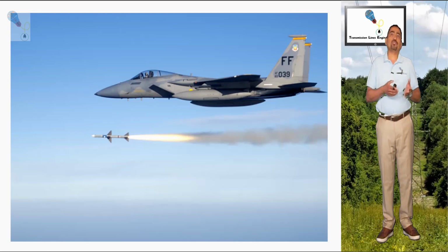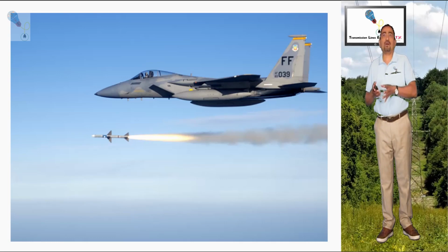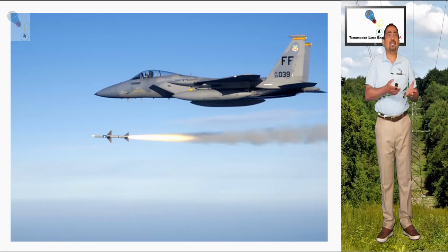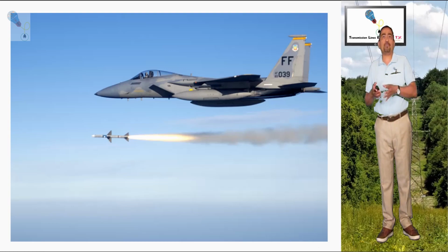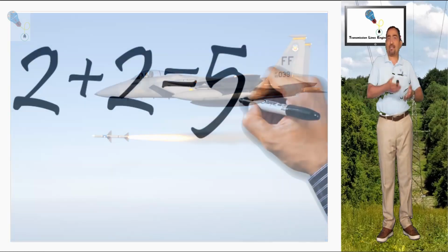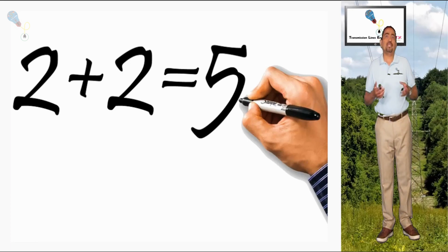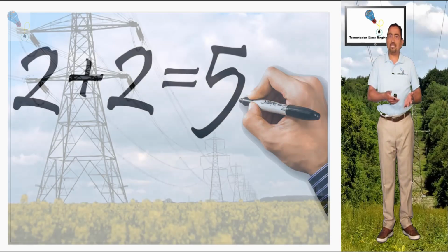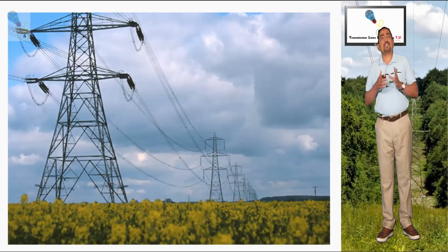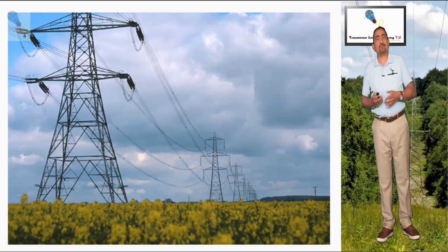It refers to the previous package, or our last chance to make changes by the clients, errors or omissions in our preliminary designs, etc. So in order to generate this package, it is necessary that a site visit has been made to inspect each structure location point to have a final position.